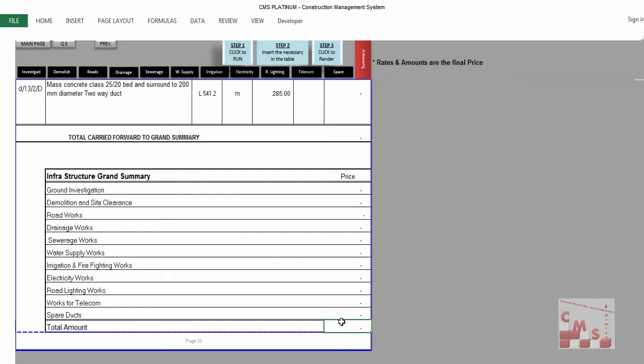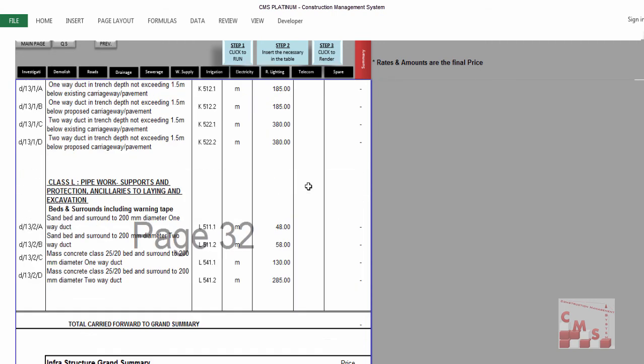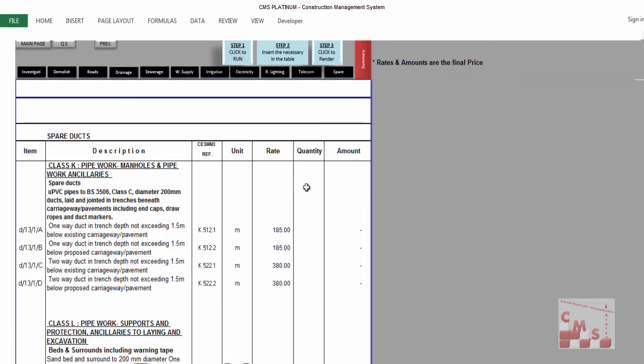Remember, this will be the final price to be presented for your client, so you have to add here the price including your overhead. The rates which you will provide here shall be including your overhead.